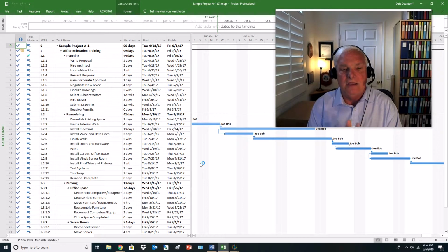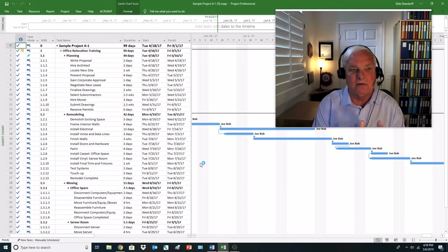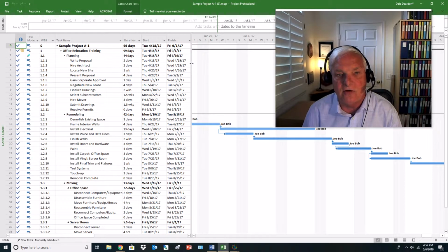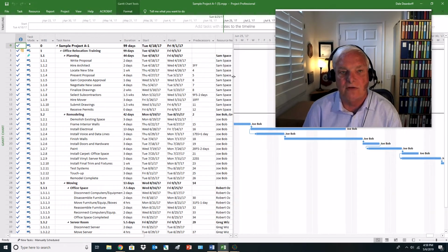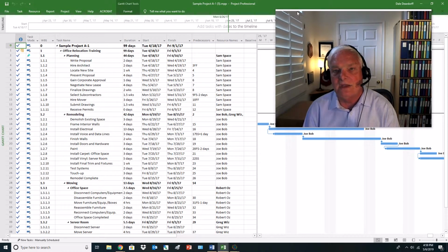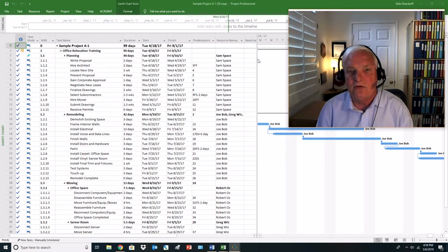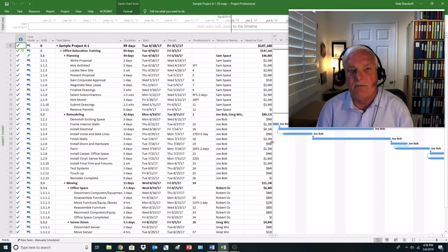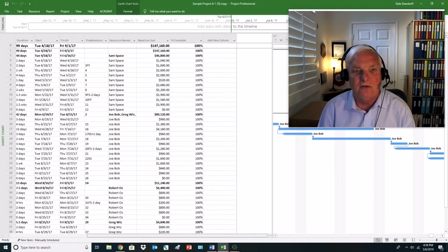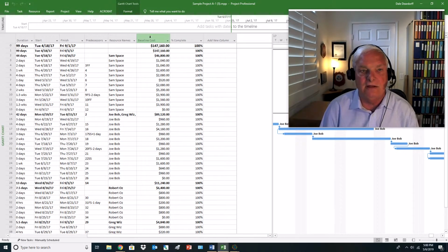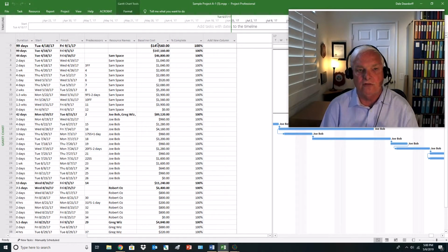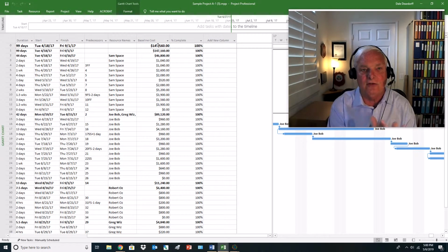This file is something you can look at to really understand what earned value is already out there for another project or another program. You can see I'm pulling at the columns, and you can see that we get down to resource names, we get down to baseline. Let me just move my picture out of the way a little so you can actually see what's over here. From a baseline standpoint, we've laid out for you what this looks like. In this particular file, it's been baselined, and this is what the baseline cost was for all of the tasks and the subtasks in the project.